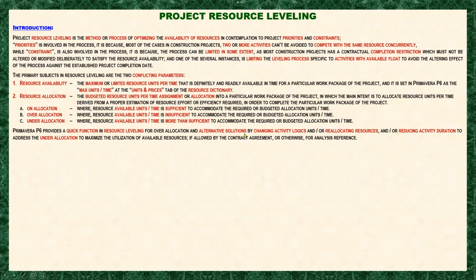Actually, mostly when the project or schedule is already established and approved, you are not allowed to reduce the duration anymore. Even the logics, you have to have the consent of the owner once the schedule or program is approved.